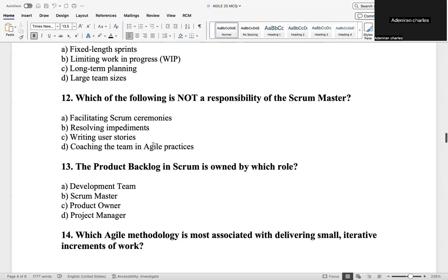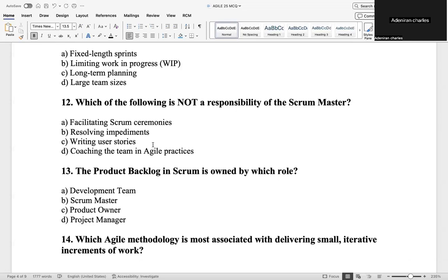Okay. The who, what, and the why. Exactly. That's always been a user story. Now, after you write that, you must create a full description. The full description always comes with what the business sends to you and what the IT person needs. Then after the description, you write acceptance criteria: the things that would certify that something is done, like a definition of done. Those are the three key things in the creation of a user story.